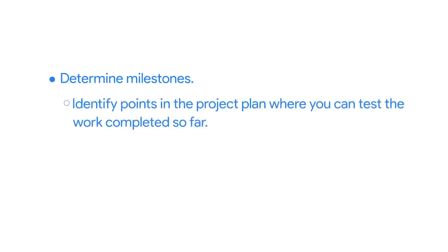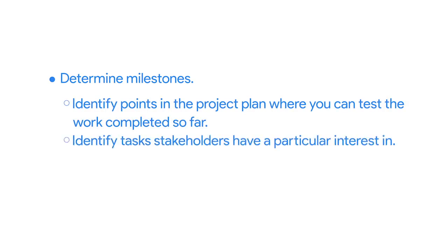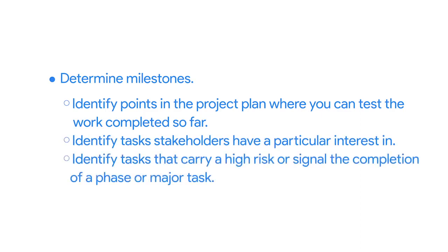Once your tasks are in order, you'll need to identify milestones. When determining milestones, it's crucial to identify the points in the project plan where you can evaluate the work completed so far, identify the tasks that stakeholders have a particular interest in, and identify tasks that carry a high risk or signal the completion of a phase or major task.